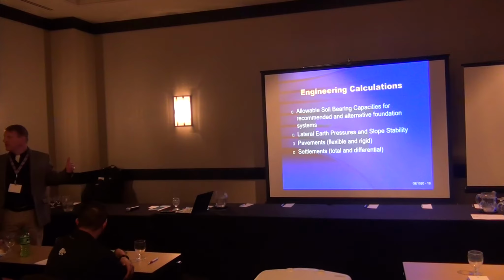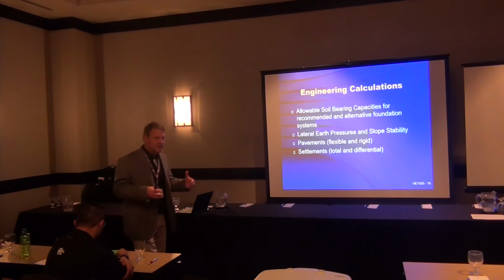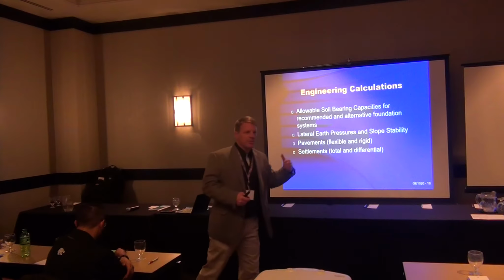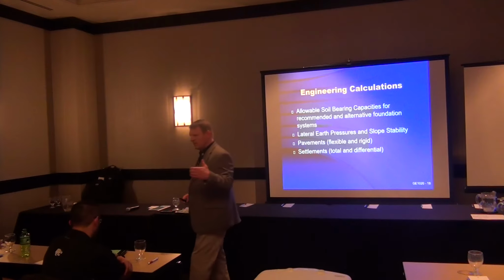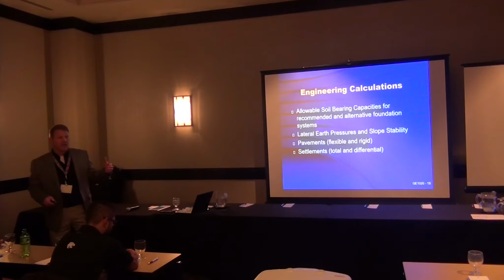You look up the International Building Code, Chapter 17, Special Inspections, they specifically call that service out, verification of foundation bearing capacities, and by code, you're supposed to have a geotechnical investigation performed prior to that.